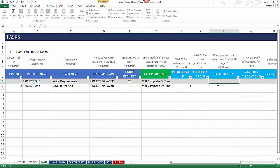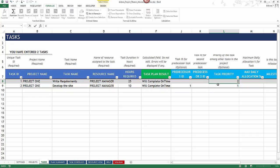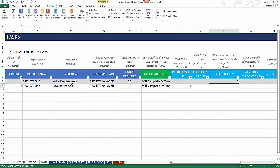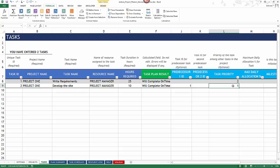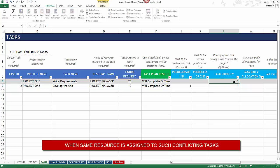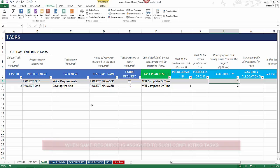For example, if task one is priority one and task two is priority two, that's fine. But if you set task two as priority one and task one as priority two, while also having task two depend on task one as a predecessor, you get a circular reference. You're telling the template task one must complete first, but also that task two is more important — a conflict. Setting task one as the higher priority resolves it.